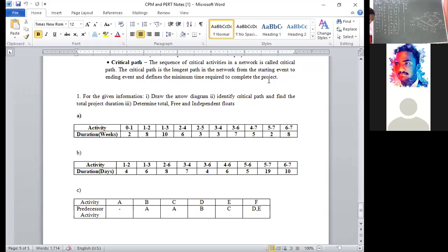EJ is equal to EI plus TIJ. 16, 13, here it is 15. Okay. 14 plus 7, here it is 21. 13 plus 2, 15. Here now 15, instead of 15 I got 27. Any query? Any confusion right now? Okay. No, ma'am. Okay, sorry for that.